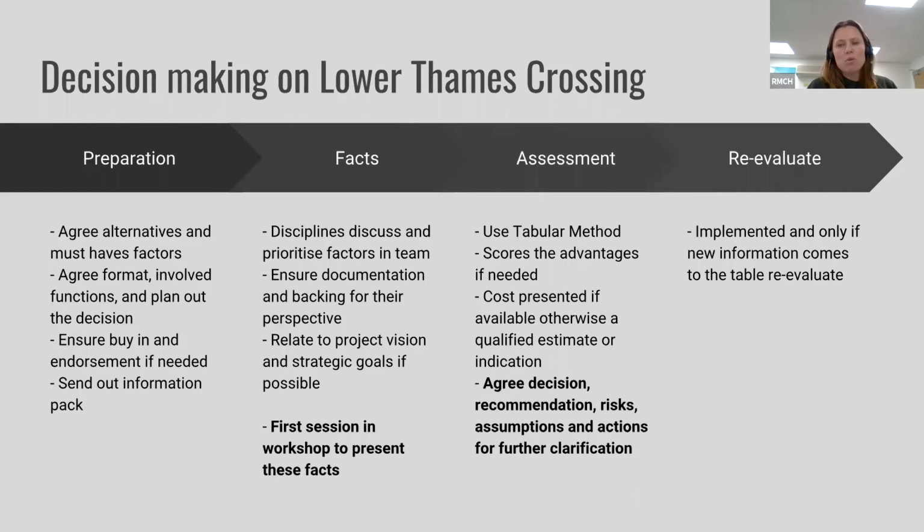Sometimes though, we had one workshop in particular where everyone in the room felt really bad about the decision, the recommendation we made, because everyone had a gut feeling that it was wrong. But we didn't have the documentation, we didn't have the facts to prove it. So we made a very strong case of writing up the risk related to this one, and it came up really high in the risk register as well. So it is being managed by the risk team at the moment, because all of us still feel that we reached a conclusion that might not stand the test in practice.